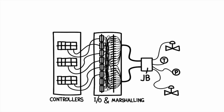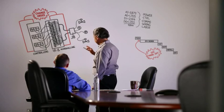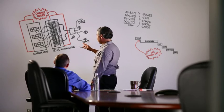So on our last project, we had to redesign two controllers and their cabinets in the field. So that's why change orders are so costly. And we can't afford to keep doing that, can we? Nope. But it's the way it's always been done.